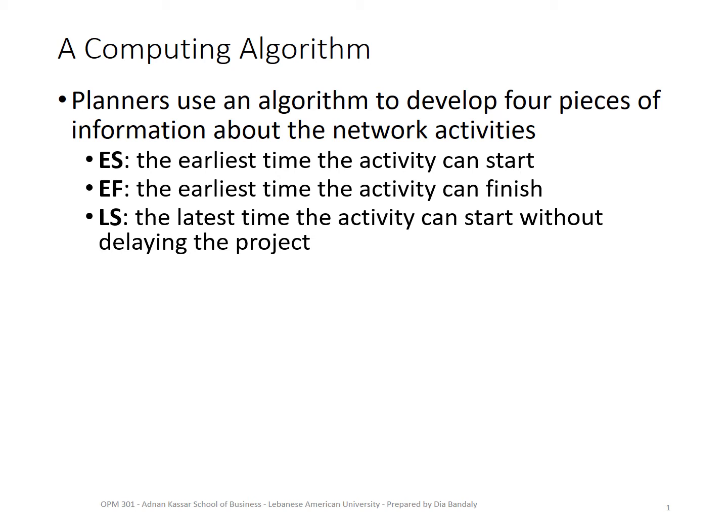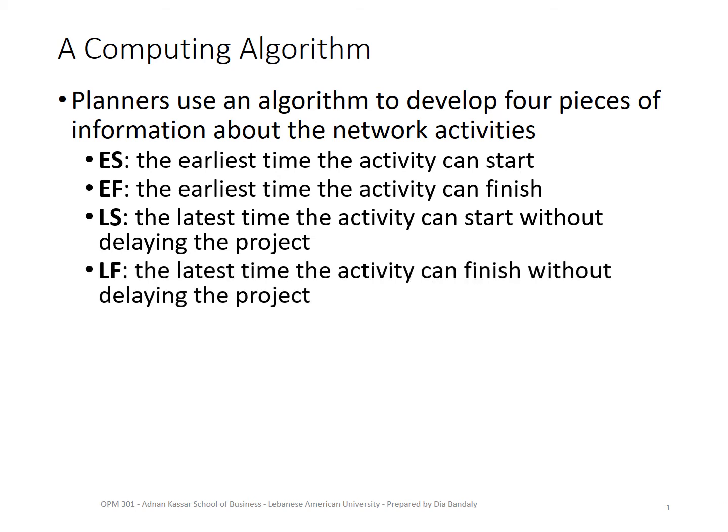So if we have this room of flexibility, then this activity can have a later start other than the early start. We're going to show that in an example that we're going to do soon. Then we have the latest finish. Same concept: it's the latest time that you allow an activity to finish without delaying the whole project.